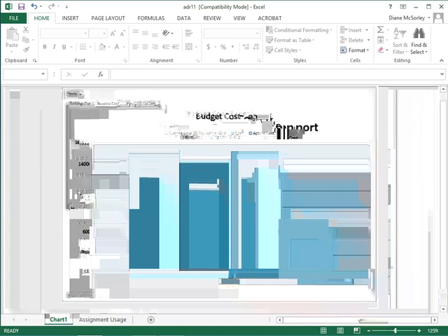The budget cost report lets me compare the budget cost to the baseline cost, to the cost, to the actual, so I can see where we are. My budget's all the way up here. It's bigger than any of the other columns. That's a good sign. We haven't overspent. All right, my baseline though is a little bit lower. That was my original plan before we started with the project. I thought that's where we would be, and you can see in the screen tip, $13,912.